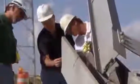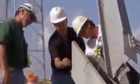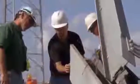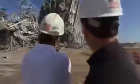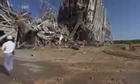By analyzing the demolished structure, the team can better understand the effects of different explosives on different materials. This is when we learn about projects afterwards, and what we learn after this shot, we'll put to work on the next one. These demolition experts can now better predict the exact amount of explosives needed on future steel projects.